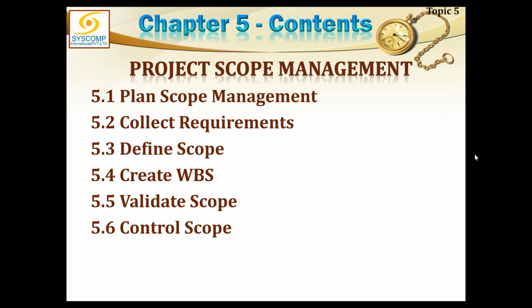So based on the requirements we have collected and the requirements we received with our charter and our contract or the agreement, putting them all together, we come up with the final shape of requirements and put them in the product scope. Once the product scope is clearly defined, only then we will try to establish the project scope, and project scope would include all the activities or processes we need to do to develop that product which has just been defined in product scope.